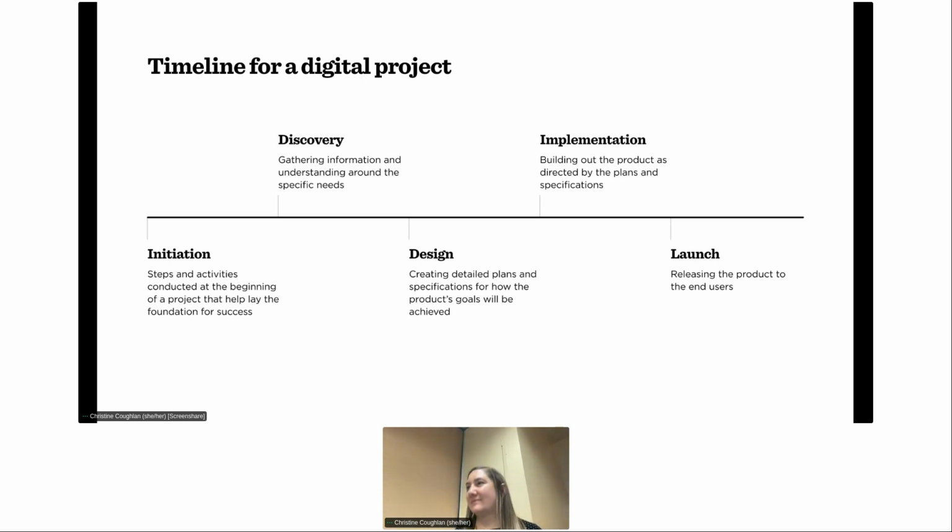It's like step number 2, right? In this process of understanding what needs to happen. And I think there's a lot of time lost if you skip that phase and start jumping to design and implementation, because then you end up going back to the drawing board when you don't have the discovery fully fleshed out. So I'm just making a comment.